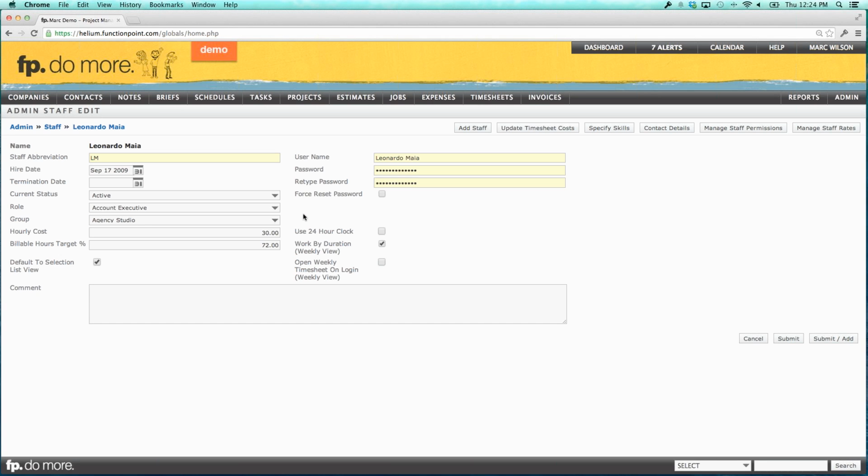But a really easy way to do it is gather up all overhead, everything from the rent for the office to insurance, to benefits, everything. Add up all the overhead, divide it equally among staff people, add that to their salary, and divide that salary by a number of hours. That is then going to give you their hourly cost. Now the number of hours that you divide it by is typically going to be about 40 hours per week times 52 weeks. If you want to be really specific and you want to take out any kind of unpaid time that a person might have, then go for it. But typically it's going to be 40 hours a week times 52 weeks.